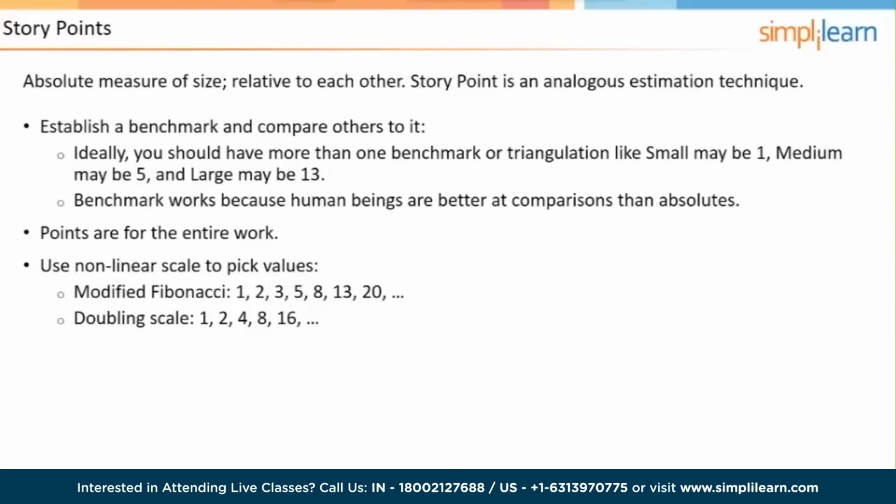But comparing the coconut to our baseline of 2, right? We came up with a baseline of 2 for the smallest user story. We compare eating coconuts to that baseline and we say, okay, you know what? It's going to take more effort to eat the coconut than it is to eat grapes or apples. So you can do it like we did.